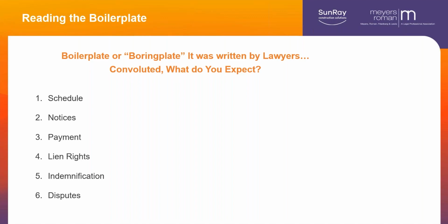Sometimes they'll be magnanimous in their contract and say, we'll pay you within 10 days. Well, that's good because they had to anyway. But one of the things that's important is people have wised up. They used to start off the payment clause that says it's a condition precedent that we are paid before we have the obligation to even think about paying you. Well, okay. Well, that's a pay if paid clause.